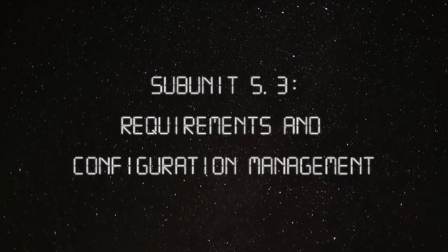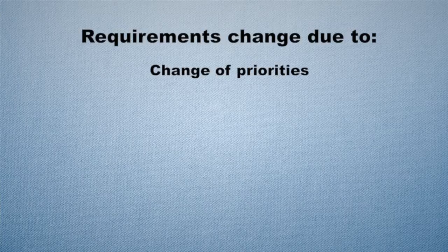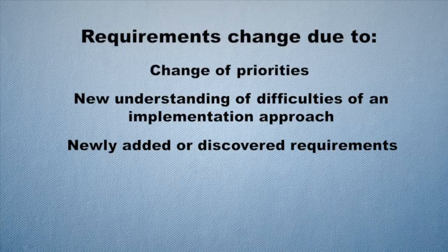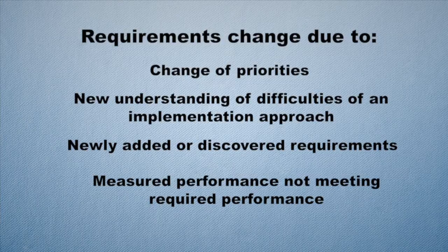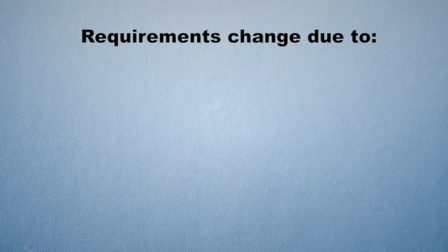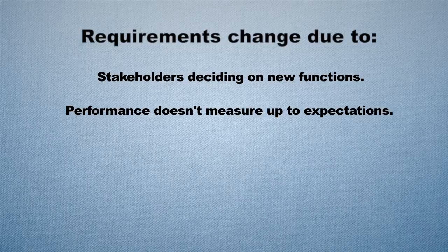Subunit 5.3, Requirements and Configuration Management. During the life cycle of a project or system from initiation to operations, requirements can change due to a number of different circumstances, including a change of priorities — maybe stakeholders have changed high-level priorities — a new understanding of difficulties of an implementation approach, newly added or discovered requirements from an insufficient early process, and measured performance not meeting required performance.